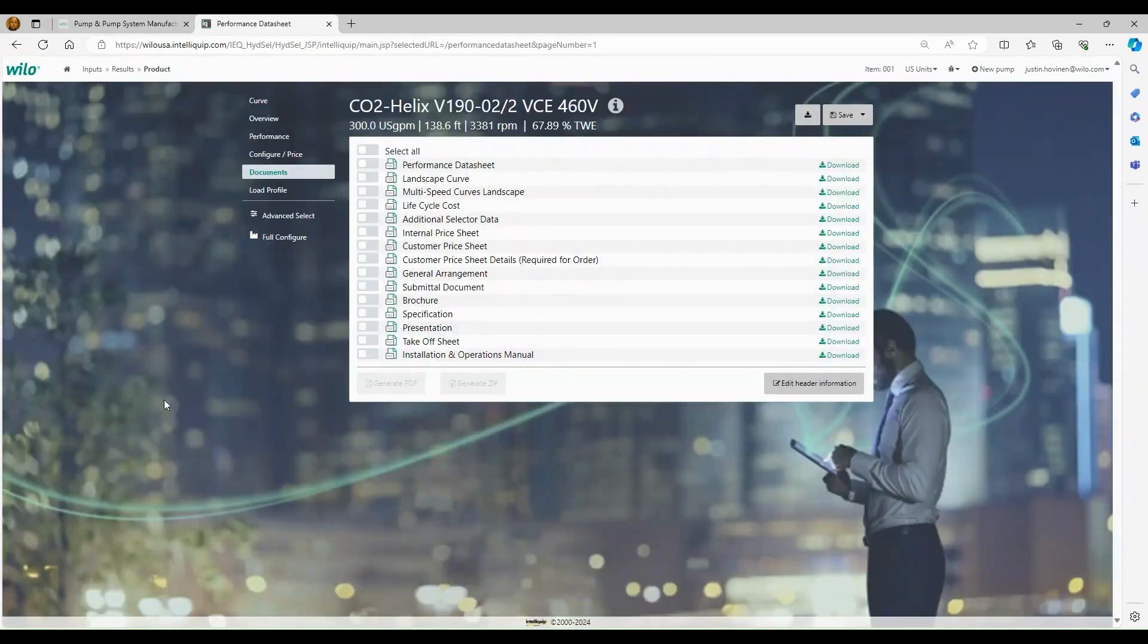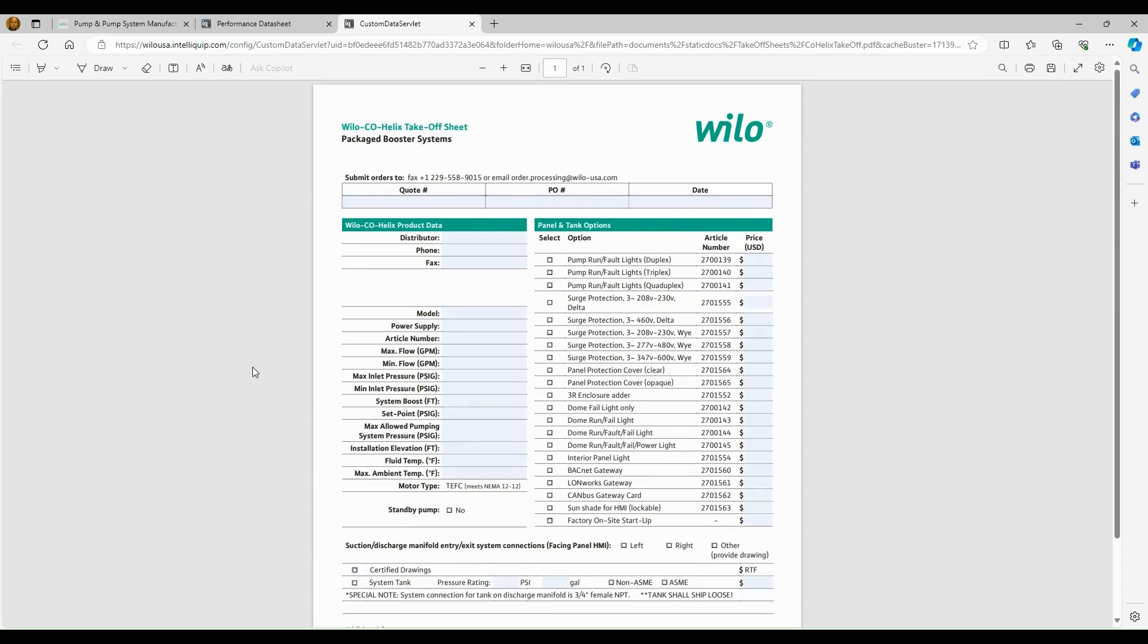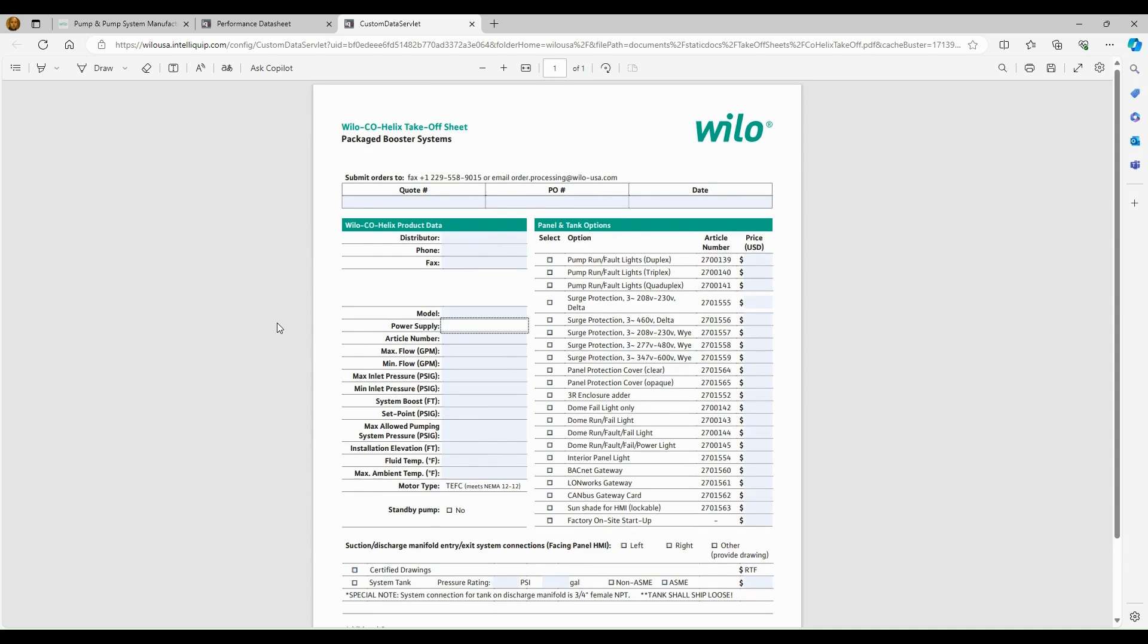The next document we're going to cover is the takeoff sheet. So this is an important document. This is going to be required for when you do submit a purchase order. We're going to require this along with it as well, and it's going to have some important information. You're going to need to confirm your model number just to make sure we don't make a mistake. Some of these pumps have similar model numbers, and they may have a difference in stage or horsepower. So we need to make sure we've got the right pump. And then oftentimes we'll have projects where someone reaches out with limited information. I may have quoted it last June. We thought it was 230 volts, and it turns out that it's 460 volts. So by having this document, it allows you to go back to your customer, confirm that power supply because that's not something that's modifiable in the field, or at least it's not very easy to modify in the field without having some expertise in control panels and how to change the fusing. You're most likely going to need a new control panel. And then we're asking for maximum flow, minimum flow, different pressures, your set point. And this document will follow your booster all the way through the order entry process. And it goes out to the test lab so we can actually test your booster to your job conditions. And then this sheet will get signed off on and just ensure that everything is per your specifications.